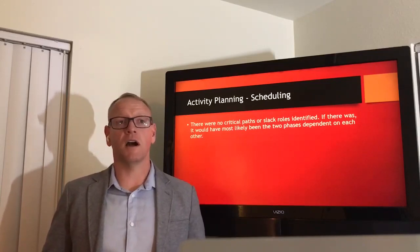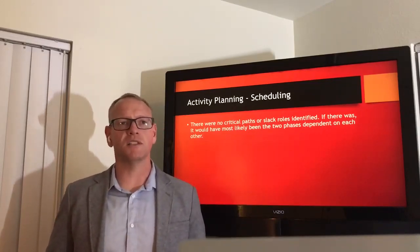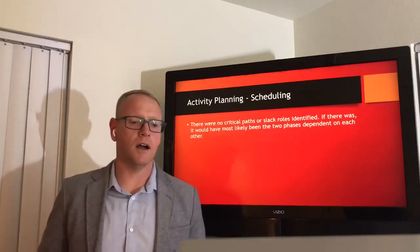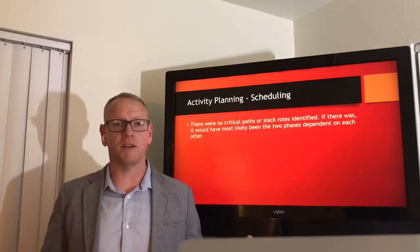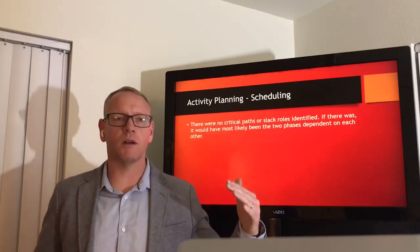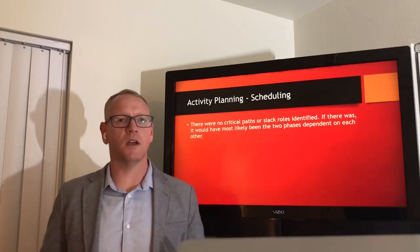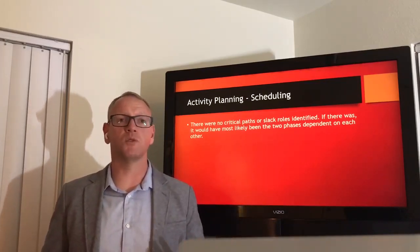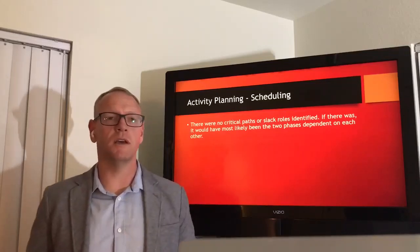The scheduling. With the scheduling, there were 2 primary phases. In this, we hadn't identified any critical paths or slack rules. Ultimately, what that would have looked like was in that preparation phase, everything was kind of critical but had the same time requirements to it. And so none of those would have had any slack to them, but they would have all been critical prior to the execution phase because they were all necessary in order to execute the next portion.